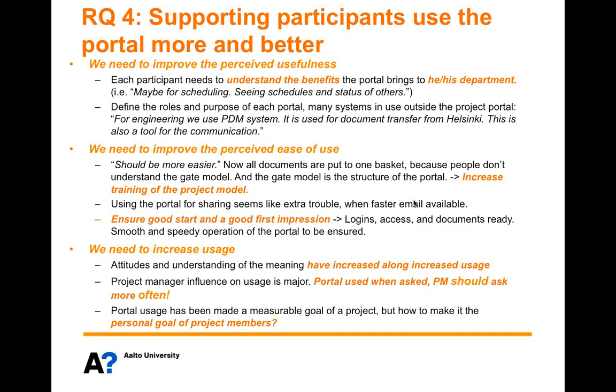And it's not always clear if the portal is in use for the project managers or for each of the participants, but there should be reasons found for each one to make the use of the portal good for them. So maybe someone could see the schedule of the project better, so he can more easily prepare for the lead time of the suppliers, for example. And also, as many tools are in use locally in the local teams, the roles and purpose of each of these tools and portals should be defined better. Do people know what the purpose of each of the portals or systems is?